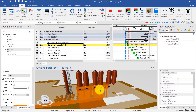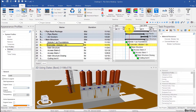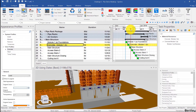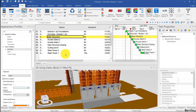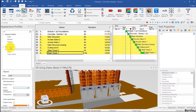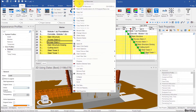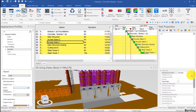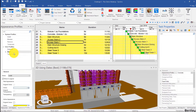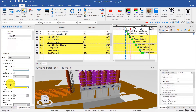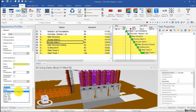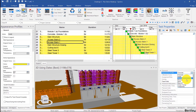This should probably grow from bottom to top — I can change that later, for now I'll keep it as is. Then we have that steel. From here on everything should be steel, so I'm going to change the appearance profile by right-clicking, select assigned resource, and change that to steel. However, the steel here should probably grow from bottom to top, so I'll create a duplicate, call that 'steel bt', not show that in legend — we only need to show one in our legend — then choose bottom to top and assign that over here.